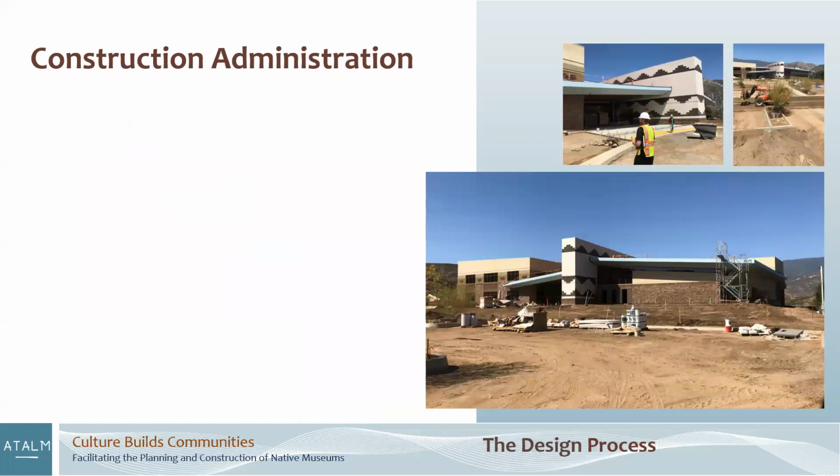Construction administration is the simple process. Once you get a contractor on board, once you've agreed, sometimes there's what we call value engineering. If their bids are all higher than what we have to spend, we have to come back in and rework some of the design features, rework some of the issues, hopefully not cut scope. Hopefully the budgets before that have been good. But then we get into the construction.